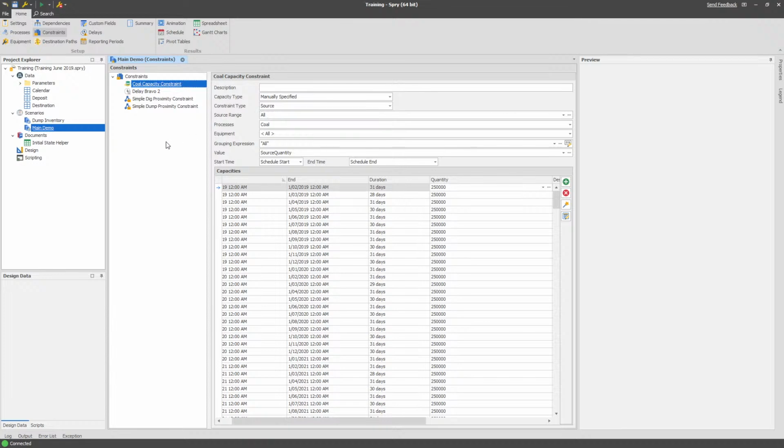A problem that I ran into several years ago was that I had a disturbance requirement for each block. I was only able to dig 3 benches within a given block every month for dust control reasons. So now we can create a capacity constraint that says don't dig excavated dirt more than 3 benches, or 3 records, within a month.